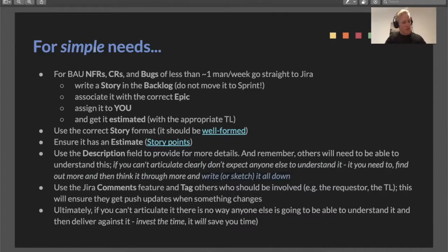Confluence pages are kind of like the notebook that you might have sitting behind the Jira ticket. So I always think of Jira tickets as being transient. You create a requirement, Jira ticket gets prioritized, gets worked on, but when it's done, it's gone. It's possible to find those in Jira, but Jira isn't the place for persistent information. It's transient. It's the work packages. It's the workflow. So you can put a Confluence page behind your Jira ticket, and the Confluence page is going to augment over time, and that's persistent.